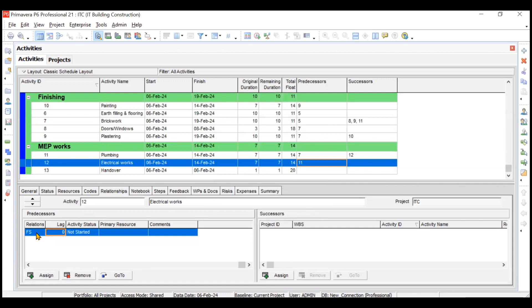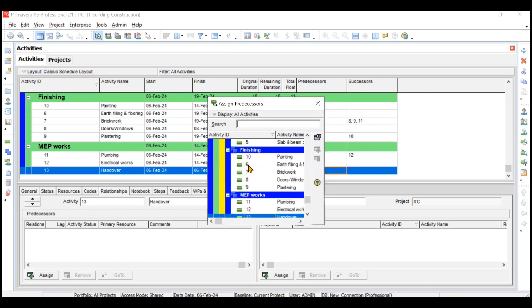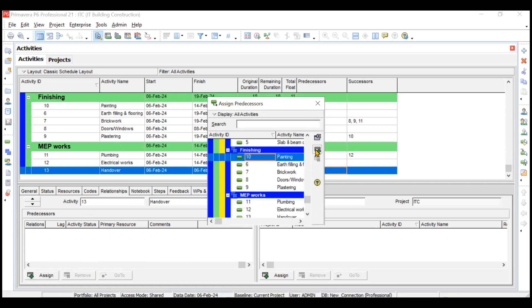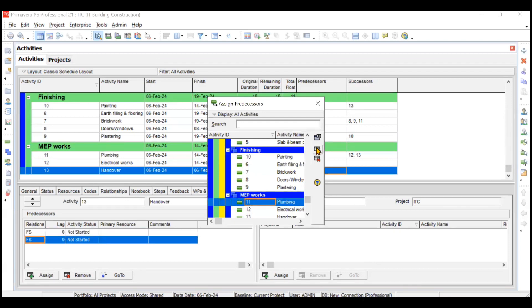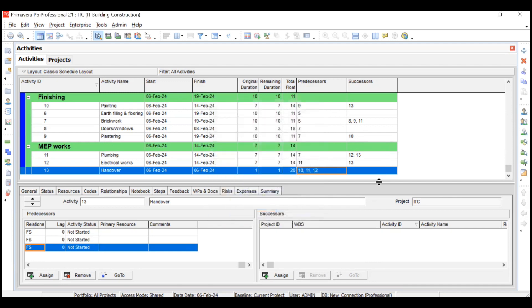Now last is your thirteenth activity, which is dependent on three activities — the 10th, 11th, and 12th. We will assign three predecessors: 10th, 11th, and 12th. So three predecessors have been assigned.